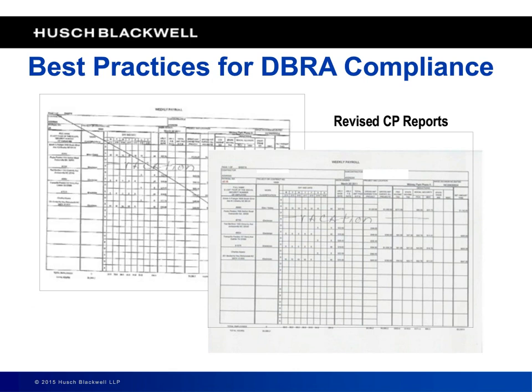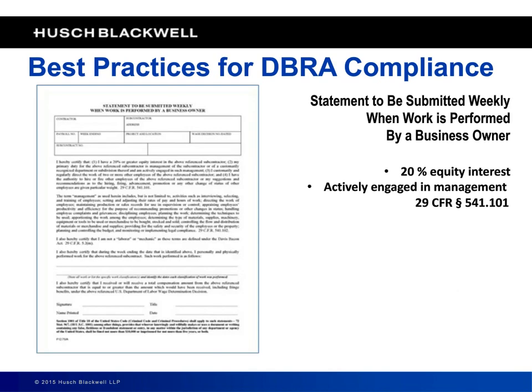All right, let's get into a couple of little problem areas here. The first one is the business owner who works on the job. And the rule is if you're a bona fide business owner or executive, you don't have to pay yourself Davis-Bacon Act wages.